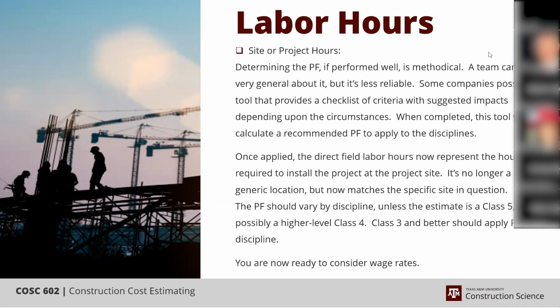If you're with a company that has moderate precautions, you think that's reasonable and all that's needed, but you decide to go work at ExxonMobil in one of their project sites and they're very safety conscious, then when you put your site productivity against your US Gulf Coast standard, you need to bump it up a little bit more for their safety issues that are required.